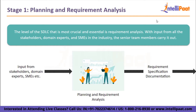For example, a client requests a financial transaction-related application. This requires specific requirements such as what operations will be performed, how they will be performed, and in what currency. Once the necessary tasks are completed, the analysis of the viability of a product's growth is finished. The SRS — Software Requirement Specification — document is prepared once the requirement has been comprehended. This document should be carefully followed by developers and reviewed by the client for future reference.